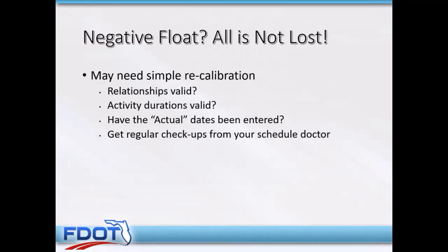And always get regular checkups from your schedule doctor. This is the person in production, or might be multiple people in your production management group, that are the real schedule experts, and they can tell you about things like milestones. Remember that event that happened? We know that schedules are living, breathing things, and things are sliding around. If you take one of those one-day events and you nail it to a certain date, that's a milestone, by the way. And there are finish-based milestones and start-based milestones, and they can tell you about things like that I haven't covered here.